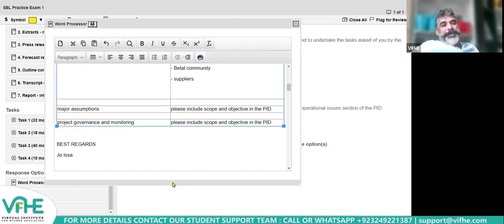Right. So what do we recommend now? I have given you enough hint. What will you tell this guy? That please include proper governance and monitoring procedures, such as the monthly progress report. To whom will we send the progress report? To the sponsor, and maybe to the board as well, because it's a big project. So can you draft this in 2-3 lines? That there should be proper monitoring procedures, such as a monthly progress report, which should be sent to the project sponsor and to the board.